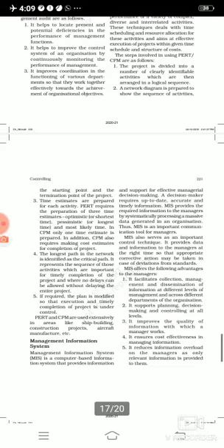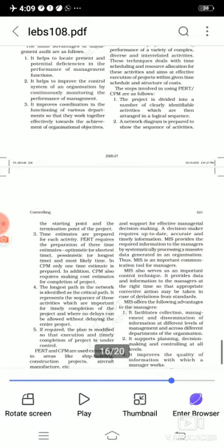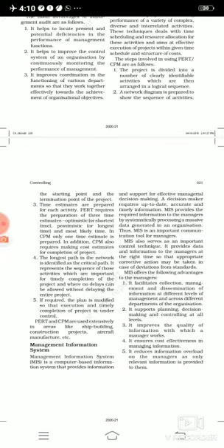Now what are the different steps when we execute the PERT and CPM method inside any operations? First, the project is divided into a number of clearly identified activities which are then arranged in a logical sequence. It means in PERT or CPM, where we have already discussed that we are taking an operation within a particular time boundary, we have to finish that operation in a sequenced manner. So the first work in PERT and CPM is that your project and your operations have to be divided into many small activities, and these activities have to be arranged in a sequence, that is, which work is supposed to be done first and then which work another.